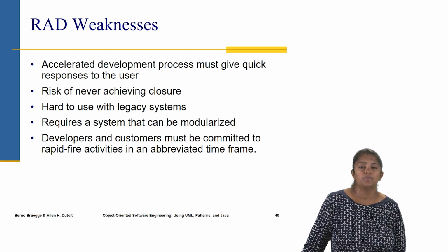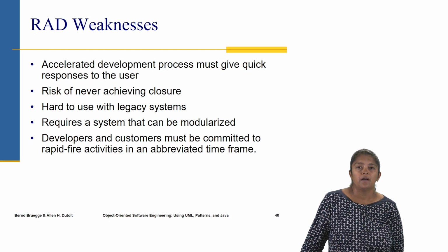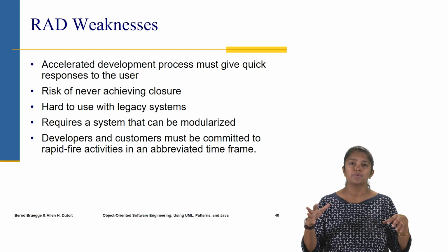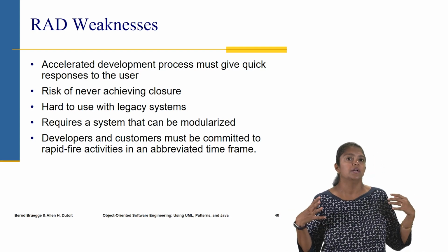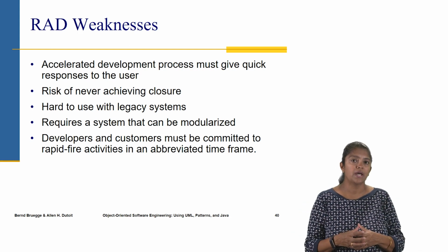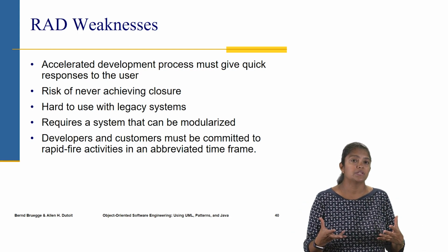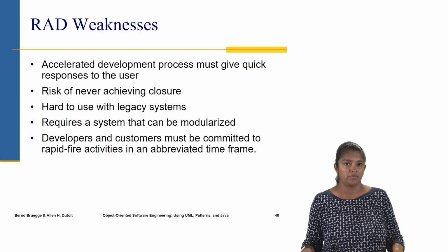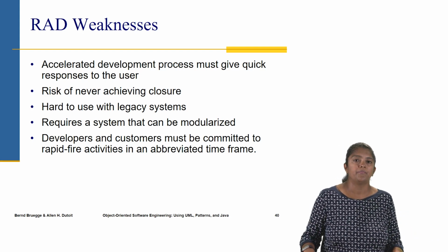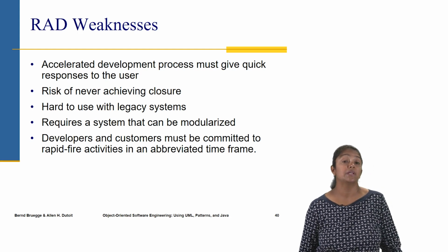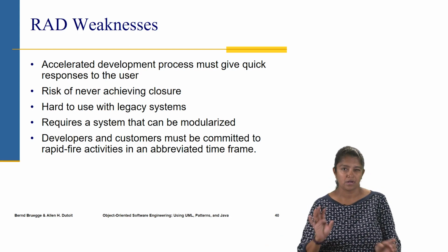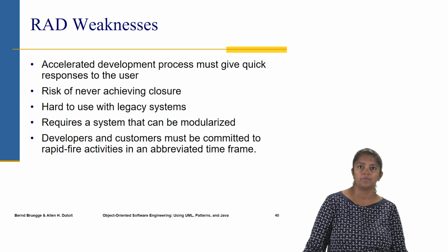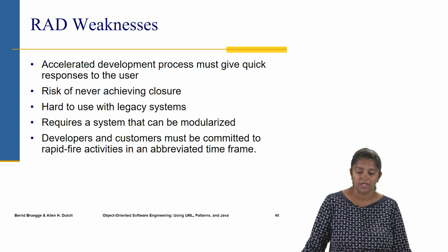It is very hard to use with legacy systems. It also requires that the system can be modularized because of the use of so many different kinds of tools and putting components together. It's important that the system can be modularized, otherwise it's hard to operate with this kind of a model. And then all of the developers as well as the customers must be committed to this rapid fire activities and ensure that a successful product is obtained at the end.